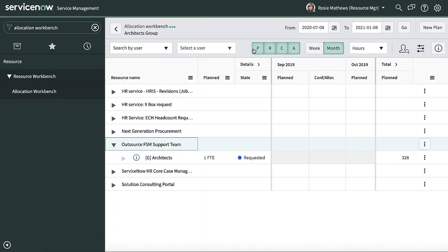The resource manager will go into the allocation workbench to see the resource plan request and check availability for the resources being requested using Resource Finder. Then, confirm, allocate, or reject the resource plan.